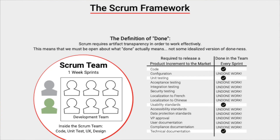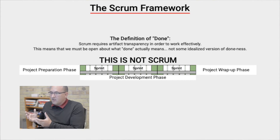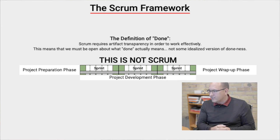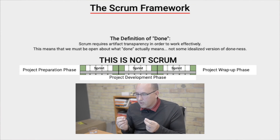Many organizations create a hybrid model, inserting Scrum sprints within a traditional project management approach. They have a preparation phase for design and requirements gathering, then a development phase with some sprints limited to coding and basic testing, and finally a project wrap-up phase for compliance sign-offs and documentation. This is not Scrum — it's a hybrid. You're using the Scrum process, but it's not the Scrum framework, because in this situation the Definition of Done is not equivalent to potentially releasable increments.